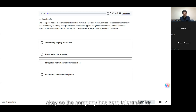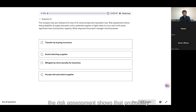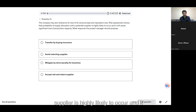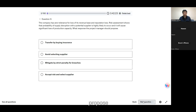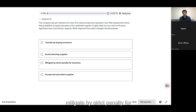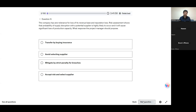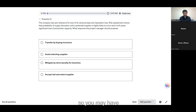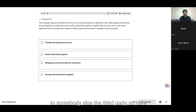The company has zero tolerance for loss of its revenue base and reputation. Risk assessment shows that the probability of supply disruption with a potential supplier is highly likely to occur and it will cause significant loss of production capacity. What response should the project manager propose? Options are: transfer by buying insurance, avoid by selecting a different supplier, mitigate by strict penalty for breaches, or accept risk and select the supplier. I think transfer by buying insurance — you may decide to transfer the risk to a third party.